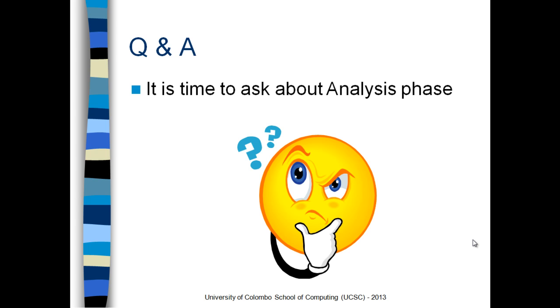Can we give a functional requirement module-wise? Functional requirements: employee management, salary, and the basic computation. This is the way we go. Once you have all the scope, you roughly identify the modules that may happen in the project, and that is the way of jotting down the scope. Then you define the modules. That's the way of managing the complexity of the system.